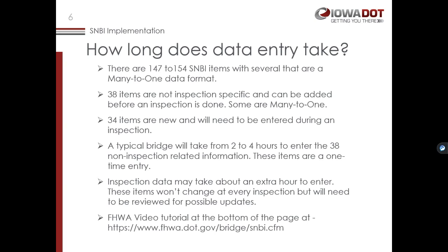And then just for the extra 34 items, just for the field inspection may take you an extra hour to get that information and enter all that into SIMS as well. So you've got a good 3 to 5 hours maybe per bridge to get all this new information in there.